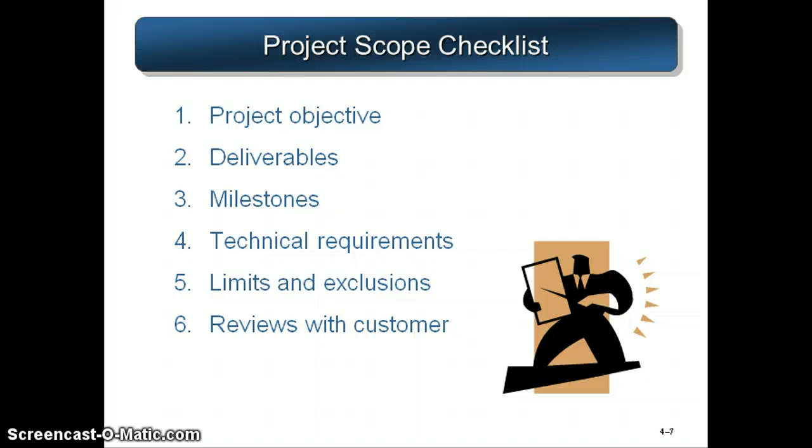Reviews with the customer. The idea here is to communicate and get agreement from the customer or sponsor on the scope of the project. This is a very, very important step that will help in getting acceptance at the conclusion of the project.